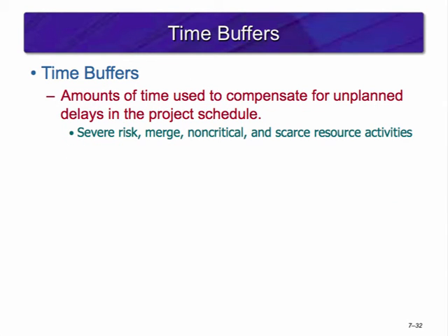Time buffers are used by project managers to cushion against potential delays in the project. Like contingency funds, the amount of time buffered is dependent upon the inherent uncertainty of the project. The more uncertain the project, the more time should be reserved for the schedule on critical activities, those that are part of the critical path.